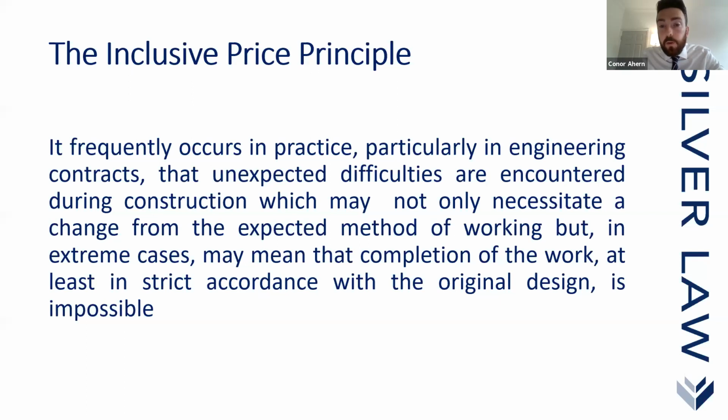It often arises where the project becomes more difficult than what was initially thought at the outset. What the inclusive price principle is saying is that largely in such circumstances the contractor will be responsible ultimately. Now, obviously, that is predicated on the fact that the contractor hasn't adequately reserved their position, or they haven't actually made it clear what their intended method of working is.